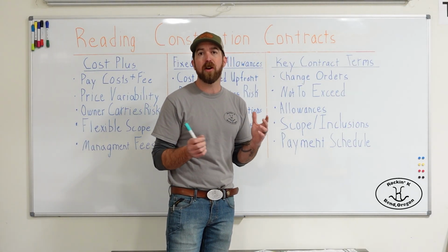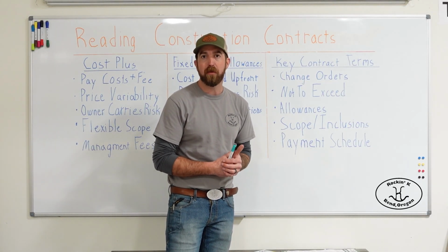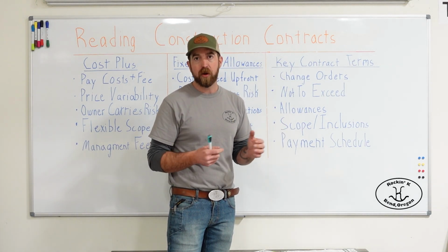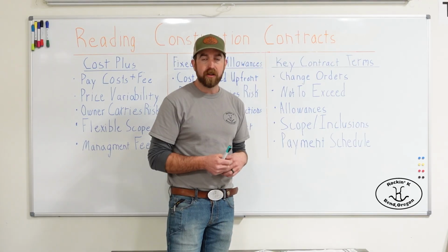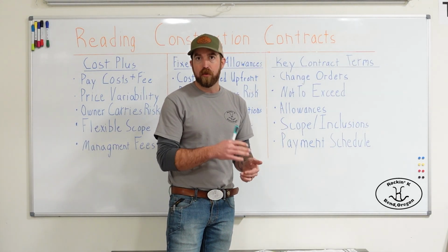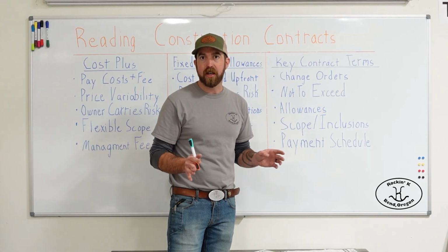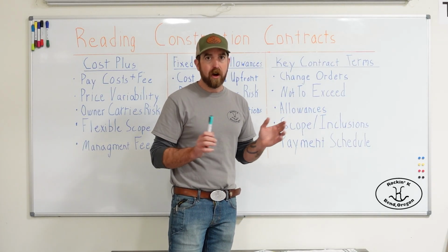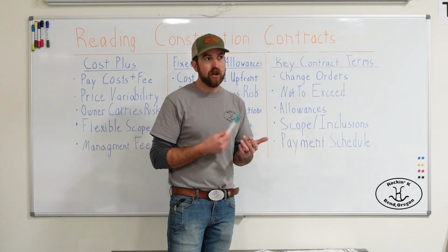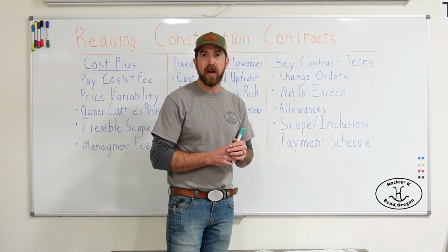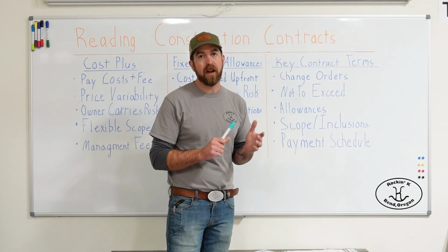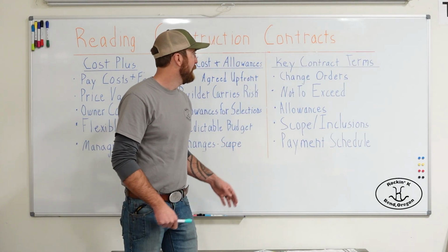You say, you know what, we weren't going to heat the tile floor in the master bath, but now we're kind of thinking about it. We got a nice tax refund, whatever. How much would that cost? You send me a request. I send you how much that would cost, and then you approve or decline that before any work is done. If you hit decline, cost didn't change at all whatsoever. So that's the kind of protection you get working with us. You want to make sure, if you're working with somebody else, wherever you are, you want to make sure you have a complete understanding of what can trigger a change order.